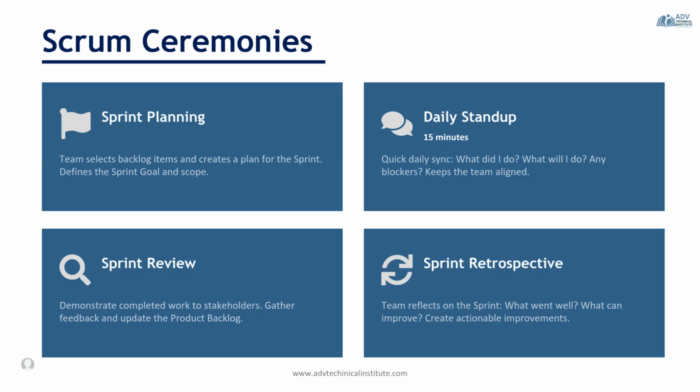At the end of the sprint, the team holds a sprint review. The developers demonstrate the completed work, the product owner discusses what was accomplished and the current state of the product backlog, and the stakeholders provide feedback. The Scrum Master facilitates collaboration and ensures the event remains productive.